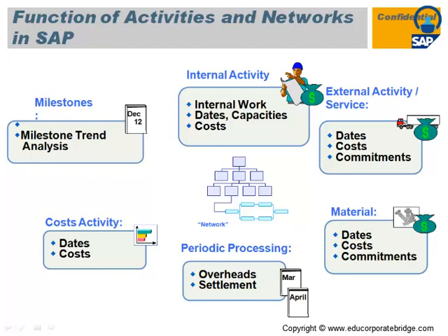Requisition is nothing but your indent, and later on if you want to procure that material or those services, you have to convert that requisition into the order through the MM module. These are the things which come under commitment. If that particular purchase requisition or purchase order has a WBS as an account assignment, or a network or an activity as an account assignment, that is called a commitment for that particular project or WBS. Periodic processing is nothing but settlement or overheads.